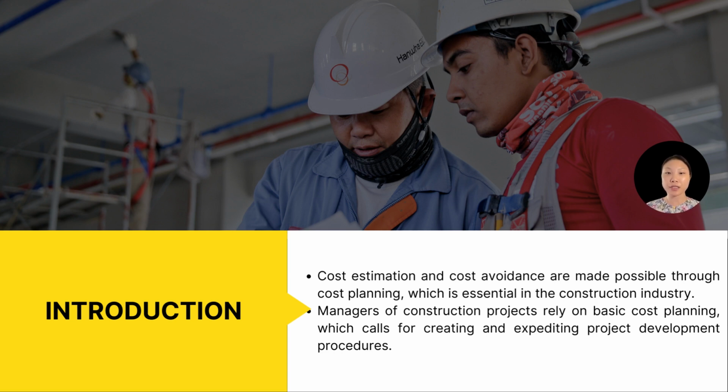Preliminary estimates are used by the client to get a basic idea of the cost and determine whether a project is financially feasible. The preliminary estimate may be used to establish how much money will be required or whether it can be afforded by the client with their current resources for the project. Thus, cost estimation and cost avoidance are made possible through cost planning, which is essential in the construction industry, and managers of construction projects rely on basic cost planning, which calls for creating and expediting project development procedures.